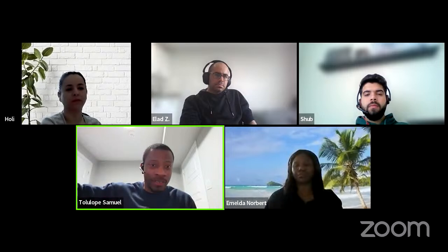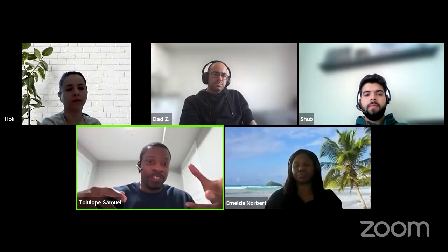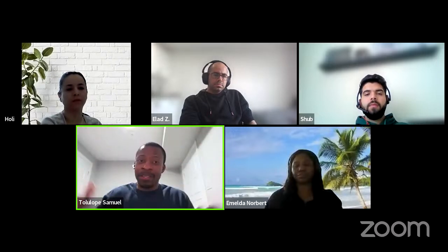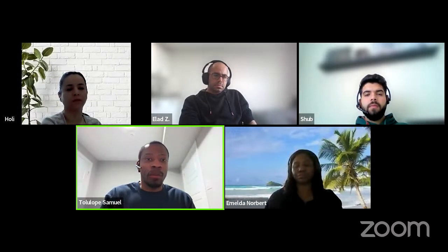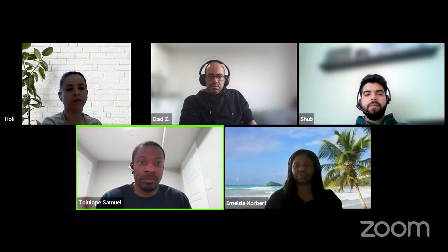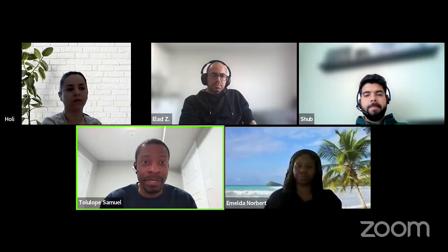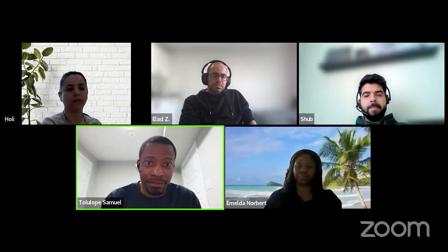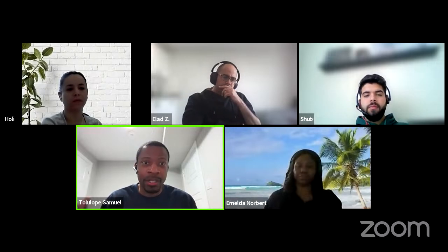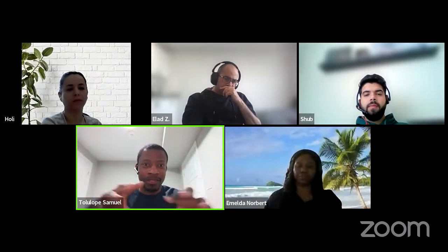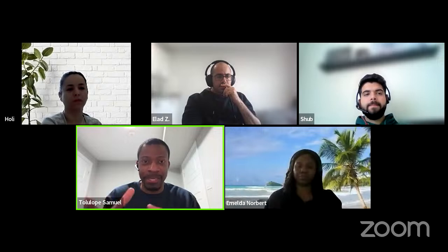So there's still going to be a status conversation that would then engage the project manager, who will engage the entire team. You would probably be the one to go to that meeting, and the other BAs are not going to be there, but sometimes other BAs join as well. The QA leads or the QA team members would be a part of that meeting. The solution architect would be a part of that project management meeting, to give updates. Business subject matter experts or your product owner will be a part of that meeting, and so on, right? So there's a broader meeting that's going to happen outside of your specific meeting, because yours is just a BA alignment conversation. It's a BA specific call.